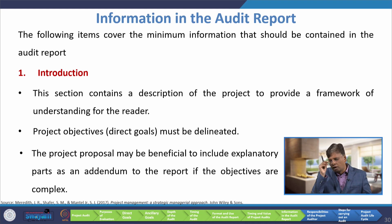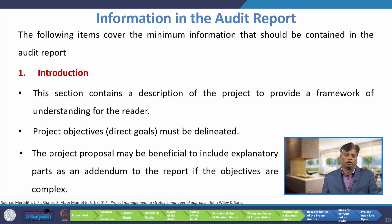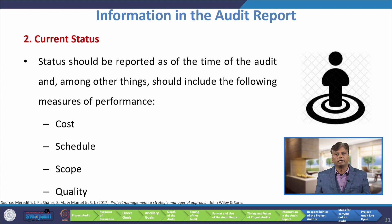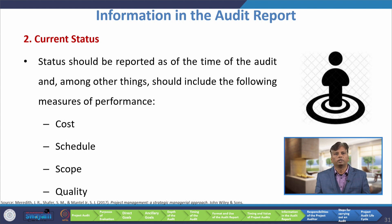Now we will discuss about some of the information in the audit report. The following items cover the minimum information that should be contained in the audit report. First is the introduction — this section contains a description of the project to provide a framework of understanding for the reader. Project objectives must be delineated. The project proposal may be beneficial to include as an addendum to the report if the objectives are complex. The second item is current status — status should be reported as of the time of the audit and should include measures of performance such as cost, schedule, scope, and quality.